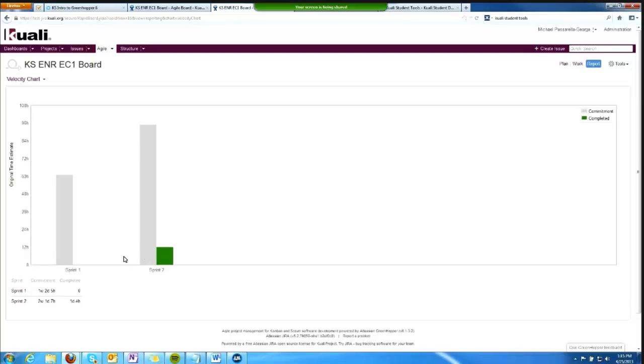Exactly how these metrics are calculated is probably a pretty good question, and if we're not logging work in terms of entering how much time we spent on a ticket, it's probably just burning down what the committed work was, like what the estimated work was, and it's assessing what did you do versus not do, I guess, as opposed to how much time did it really take to complete something versus how much time did you estimate it might take.